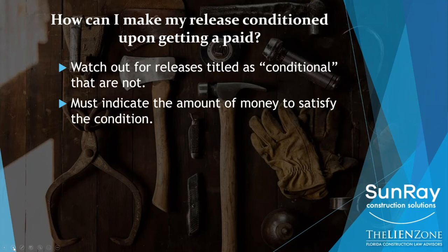So a few things to watch out for. Sometimes we see release forms that are titled conditional. On the top of the document, it'll say conditional partial waiver and release. But when you read the document, there's nothing conditional about it. If that's the case, it is not a conditional release. You cannot make a release conditional just by changing the title. It has to have language like I just mentioned.